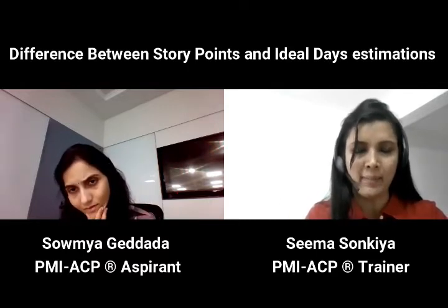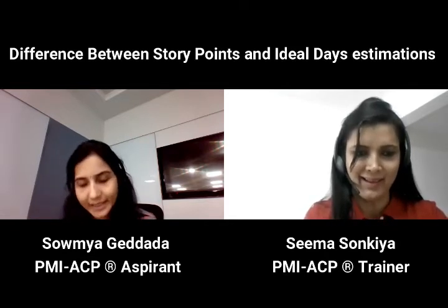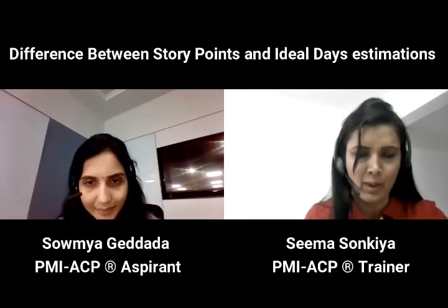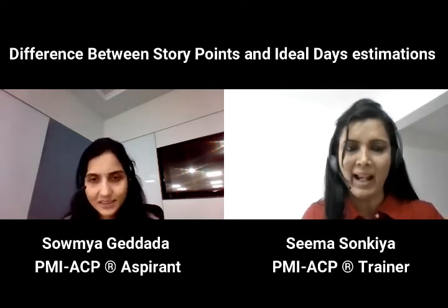And if we estimate in ideal days, my ideal days are never equal to your ideal days, because my expertise is different from yours, my environment is different from yours, and I need to go through different trial and error.